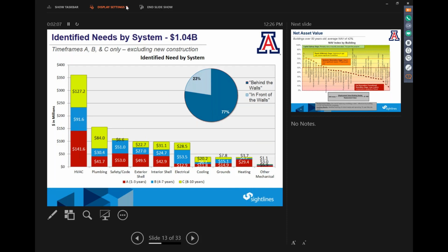The building systems, as we talked about, and the criteria of deferred maintenance. You know, when you're looking at criteria, breaking those down, you have the priorities. We talk in priorities 1, 2, and 3. What are the most urgent needs that could affect the continuity of operation within the building? That if it goes down, what is the catastrophic failure to faculty, staff, research, animals that you may have in terms of research in the building, students, and such.